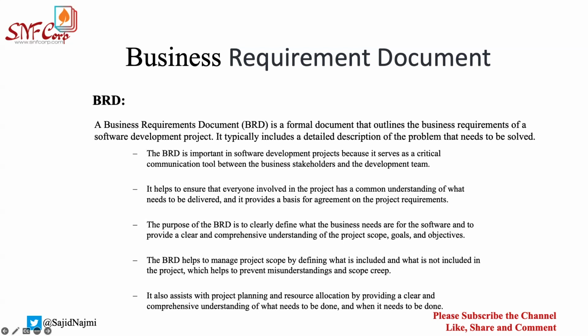Now there's another term, gold plating. Gold plating is nothing but the same thing coming from the development team. You or a BA, your development team is trying to give something more so that business will be really happy. However, that is not the actual ask from the business, and you're still going to go ahead and add it, considering this will not impact your quality, timeline, cost, and everything. Even though this will not impact, this will be considered gold plating, that you're trying to please someone. This is a big no in the software industry, so you should not do this.